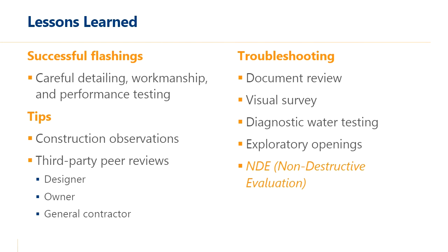Third-party reviews might be something to consider, whether that's retained on behalf of the designer, just to get a second set of eyes at some of those odd intersecting cladding regions, or as a requirement by an owner, or a few times we've served for a general contractor. So a general contractor may bring in a design entity to review the documents and help them submit RFIs sooner in the process for maybe some detailing that's not clear, or where the substrate conditions make it difficult to install, or could make it difficult to install.